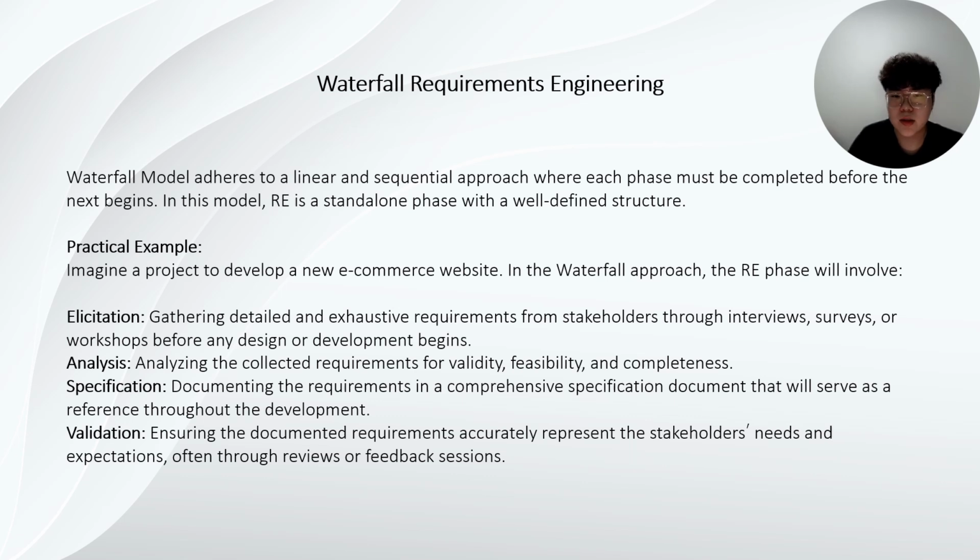Analysis, analyzing the collected requirements for validity, feasibility, and completeness. Specification, documenting the requirements in a comprehensive specification document that will serve as a reference throughout the development. Validation, ensuring the documented requirements correctly represent the stakeholders' needs and expectations through thorough review or feedback sessions.